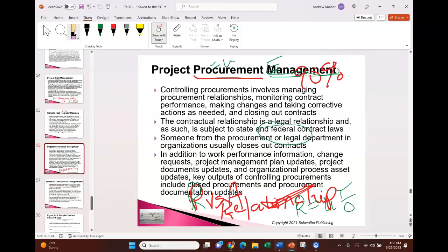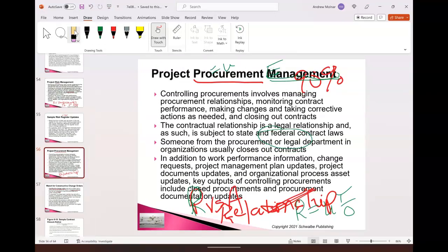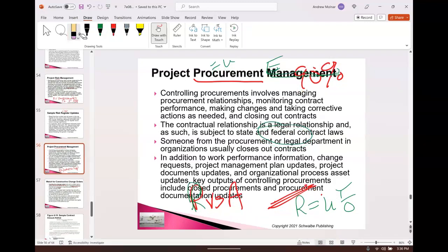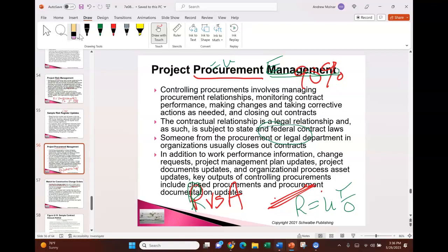So what I always emphasize, project manager, create a great relationship with your procurement manager. Have a relationship with them. They don't know the scope you're trying to accommodate. Only you do. So you've got to express it so they can get it in the contract properly. The standards, the schedule timing, the quality effort, etc. So change control, build change control into it. That's natural in the project you've just built, but not natural to the seller who will sign the contract and become your vendor. Right? So you want to build that in.